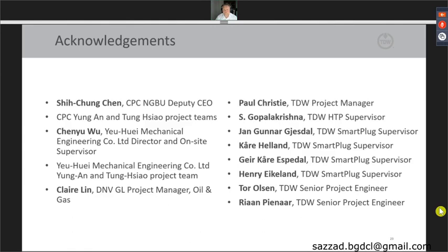Mr. Muhammad Zaman raised a question: how was the leaking problem of the ESDV solved? In this particular case, they replaced the ESDV at the Tongshow receiving end. So they replaced the whole valve with a new valve. At the Young end, they overhauled the valve. Basically, they opened the valve, replaced some seal rings, and also replaced some seal rings on the flanges.